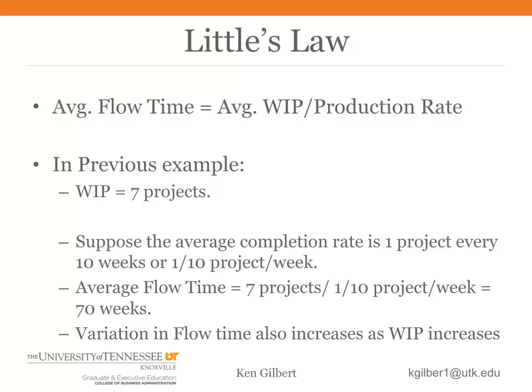An even more important thing that Little's Law does not tell you: the variation of flow time also goes up as WIP increases. The flow time will not be exactly 70 weeks, it will be 70 weeks on average. A particular project might take much longer or even much less. That unpredictability is what makes scheduling resources and support so difficult.